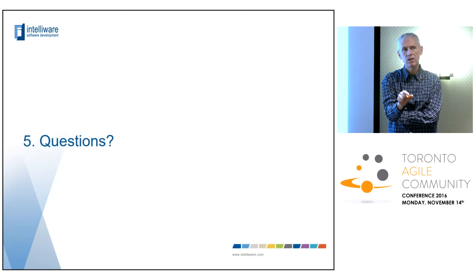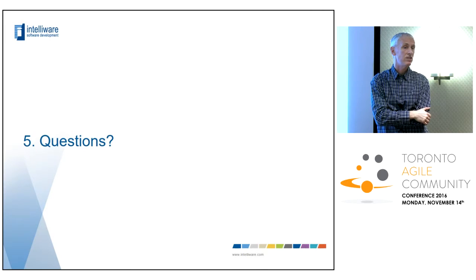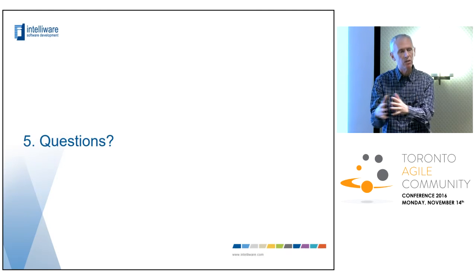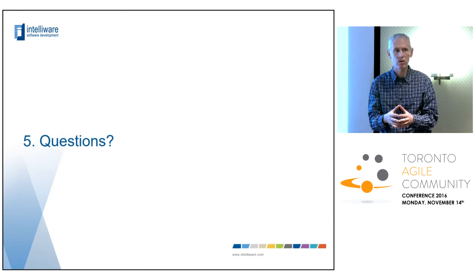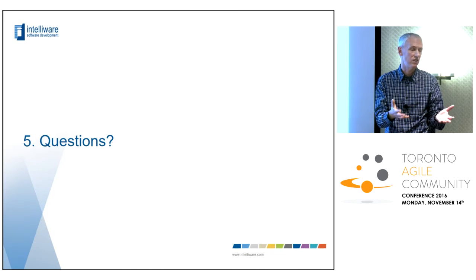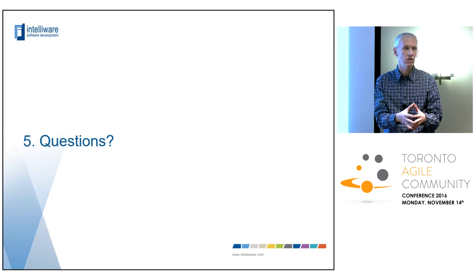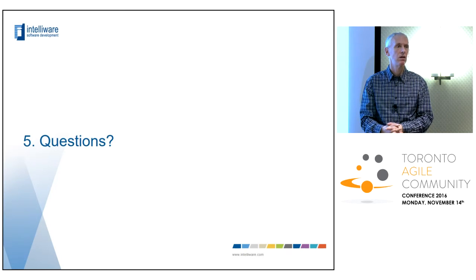So can we say they will be operating at 100%? So, yes, I think the short answer to that is yes. They're going to be working at 100% of their capacity to work on the project. It actually doesn't matter how much supporting work they do and how much story work they specifically do. What you need to assume is that they can keep up to whatever your planning constraint is. And if they can't keep up, then you need to look at what's potentially bottlenecking them or move the constraint. But don't estimate something that's not a constraint.